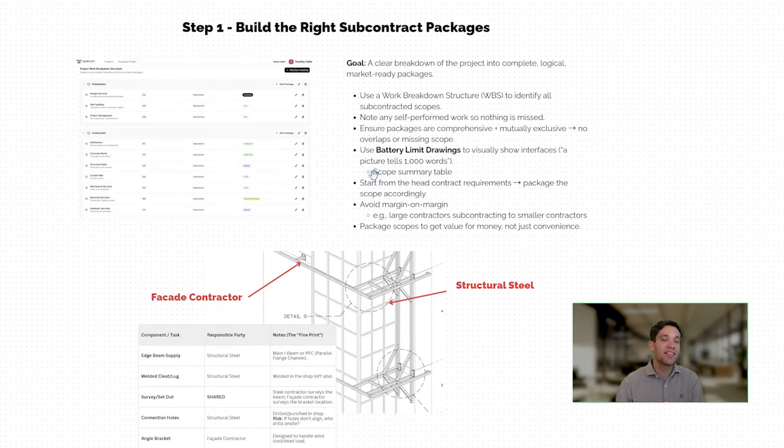estimating process, particularly if you're a general contractor that subcontracts out the majority of the work. The way you structure and manage your packages is the biggest determinant of the cost of managing those packages. We want to do it in a way that maximizes and leverages market competition, but doesn't leave us having to manage 1,000 tiny different packages and run into a whole lot of coordination issues during construction. So there's a real art to doing this effectively.